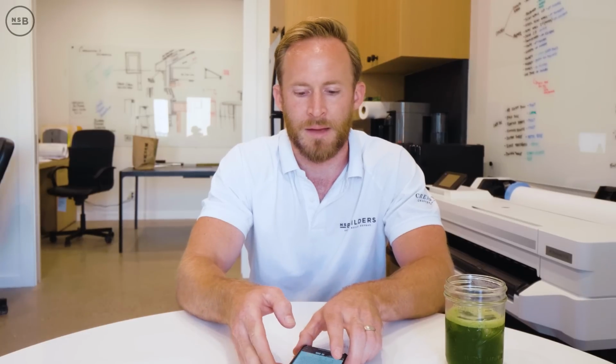Great question, and let me elaborate a little bit more on the pre-construction, because in a previous episode, we talked about what that pre-construction process is. So let me kind of recap that. We take a fee, and depending on the size of the project, it can range from $10,000, $25,000, or greater than that. If it's a smaller project that we tend not to do as much anymore, that fee would be less. It's based on how many hours we think we're going to spend in developing the budget and working with the design team and the client to help outline the scope, the budget, and the schedule.